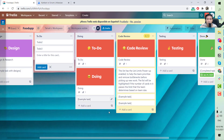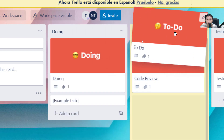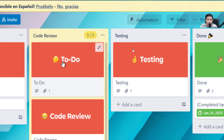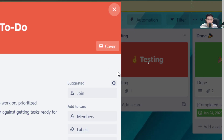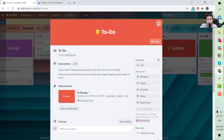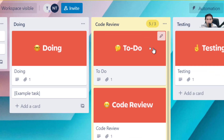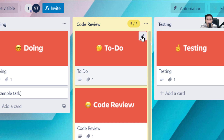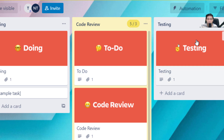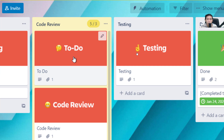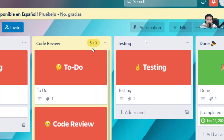After the developer has finished, they move the card to Code Review. In Code Review, a technical lead will review the code to make sure it adheres to best practices in software development. After the review, if everything passes, the code is deployed to the site so that QC can start testing.